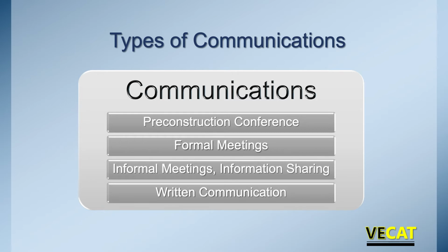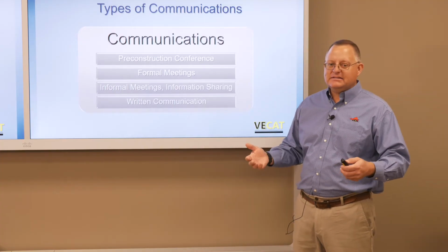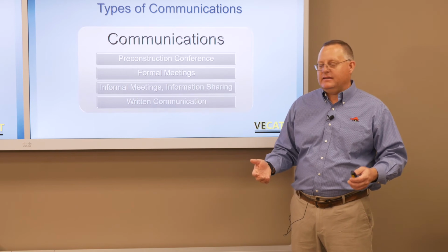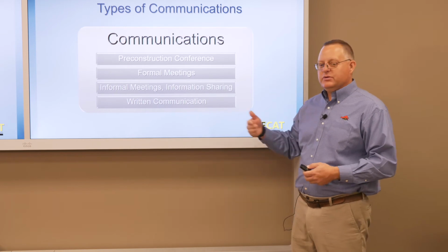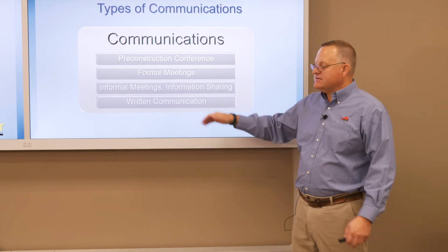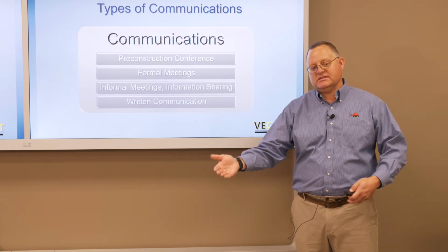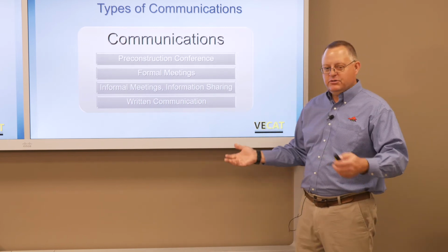We'll hold formal meetings. They may be required by contract, but a lot of times we'll do informal meetings and information sharing. You know, what type of results did you get? What are you doing here? A lot of communication constantly to make sure that project's successful. Very importantly, those written communications. So if something's decided or guidance is given or a request for information is made, we have written communication to document what was decided, so as we go forward, if something was to come up, we have something to fall back on and say, well, this is what was decided. Here was who was in the meeting, here's who agreed to it, etc.